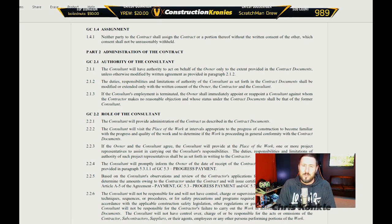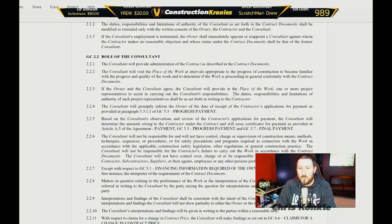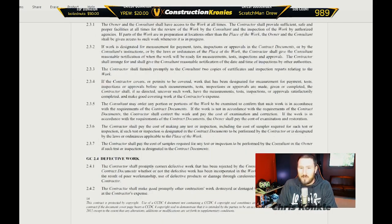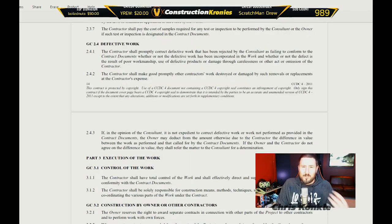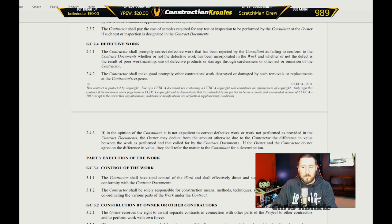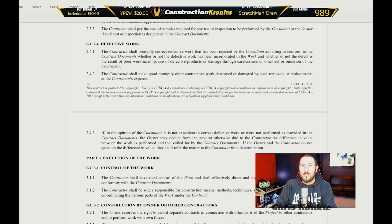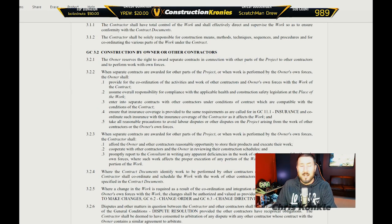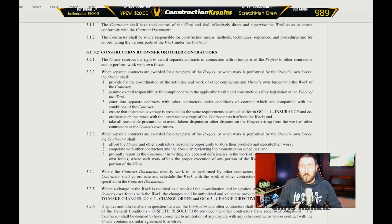This document will also state how many days between payments — like between invoice and payment. The roles of the consultants, or what the consultants do, will tell you a lot — like who to talk to and the order of things. This is always based on the type of delivery system being utilized for the project. The traditional design-bid-build will usually be under the CCDC2 contract, whereas construction management will have a similar contract but whoever holds the contract will be different — instead of the owner, it'll be the construction manager.